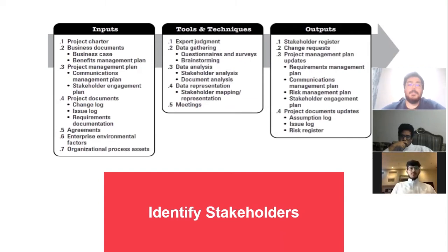The tools and techniques that we have in stakeholders are expert judgment, data gathering, data analysis, data representation, and meetings. For the outputs that we get from this technique, they are the stakeholder register, change requests, project management plan updates, and project document updates. Okay, let's go next.